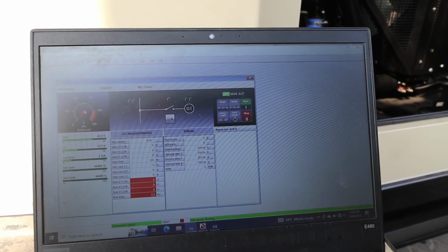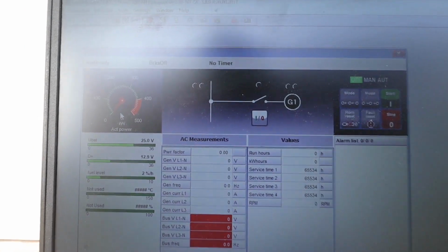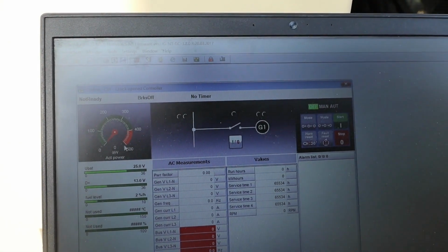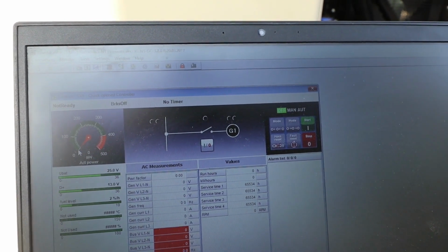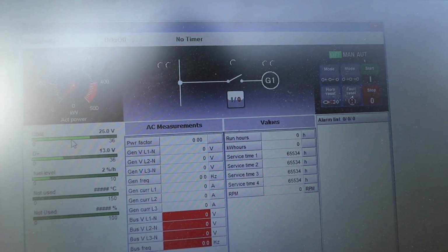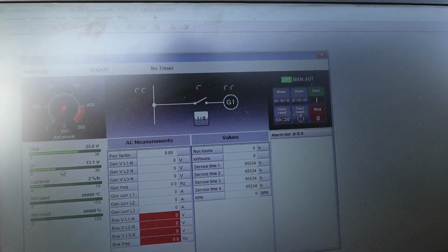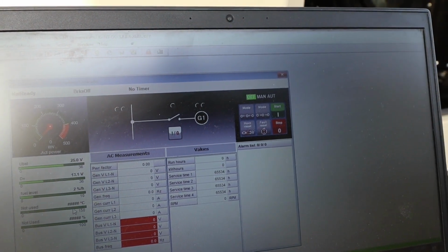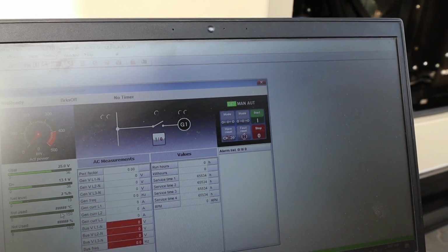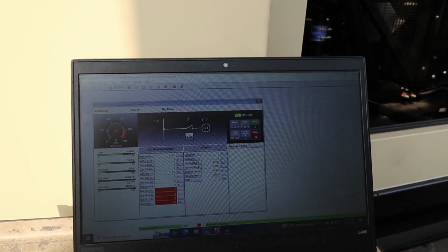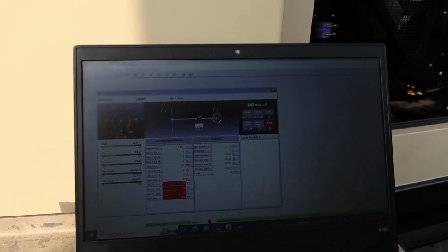So also here you can monitor, on this other side, our kilowatts, how many kilowatts we applied on this generator. We are applying 400 kilowatts for this, because this one is 500 kVA. Also you can monitor the battery voltage, the D plus, and the fuel level, and the rest here is not used because we are using the ECM for the communications of your sensors, like the temperature and everything. So now I'll try to start up our engine. We are going to crank first for 3 attempts before we fire up this one. That is the standard way of doing commissioning.